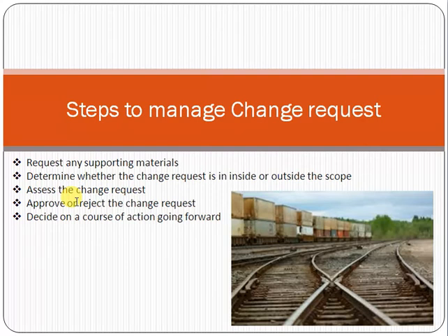After making the change request, you will submit it to the change control board. The change control board is the higher authority that has the authority to approve or reject a change. Once you submit it to the change control board, meaning senior management, the CEO or the CTO, the C-level management, they have the full authority to approve that change. Why approve and reject? Because, friend, generally a change request has an associated cost, so approving means they are approving the associated cost.